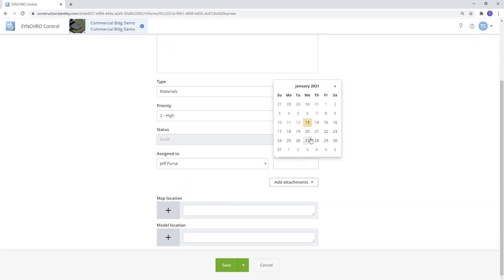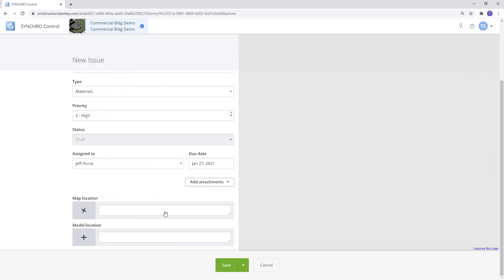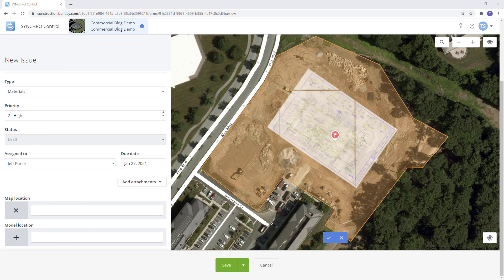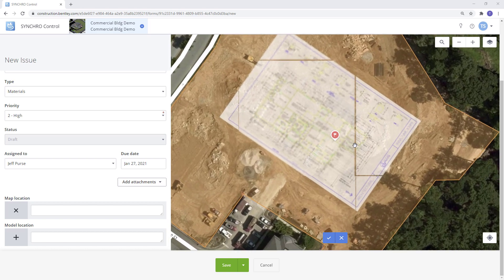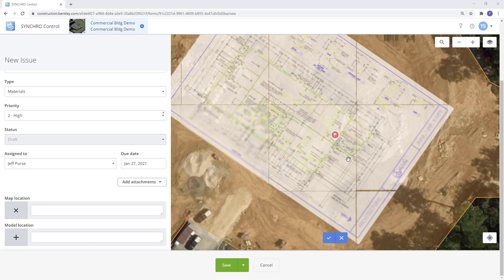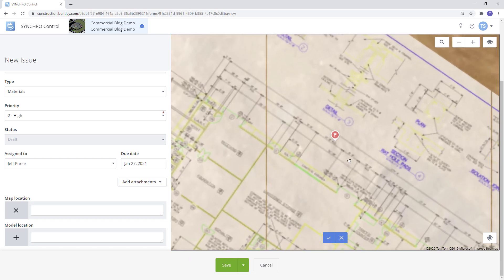It also allows users to add documents from your computer or from your Control documents. Within Synchro Control you can geographically tag your forms in the map option. As you can see here we have a PDF from the plan set attached directly to the map which we can reference to tag our issues. This becomes very handy especially if your project doesn't have a 3D model yet. Simply drag the icon to the required location on the map and hit the check mark.